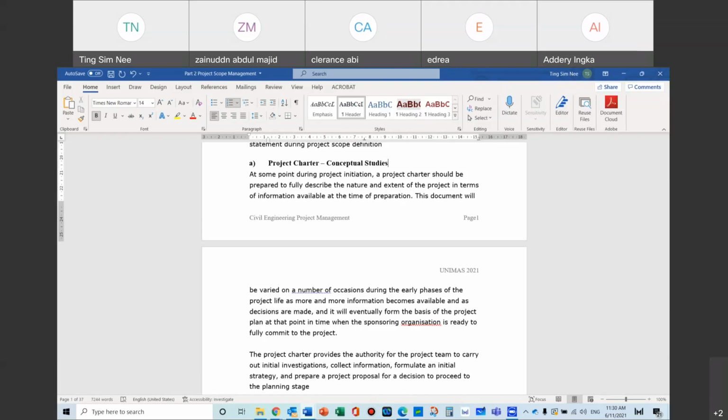Not only is it a social thing, but it will actually affect the usage of all the other facilities that you'll be building later on. You can say, okay, the houses that I built on my site are going to house about 200 people in this area. But if we don't look at the existing demographic studies, that means you don't look at the existing people around the site. Then when you're building your drain and your water supply, you're only thinking and limited to your site only. And then later on, after you build the site, like 2 years down the track, suddenly every evening there's water trickling, or you get flash flooding all the time in your area.